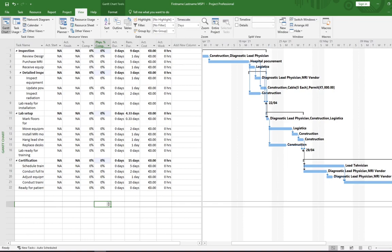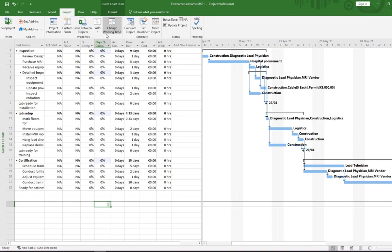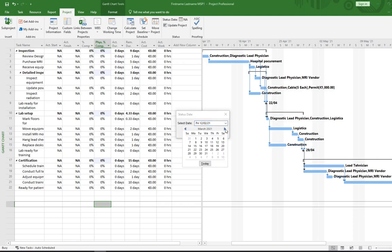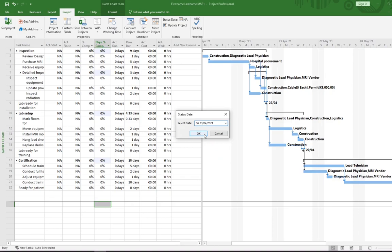This table has several fields for actual values. First we need to set the status date — that is the date up to which work is considered done. Go to the Project tab, then the Status section, and click on the calendar icon. Set the status date to Friday, 23rd of April 2021, then click OK.